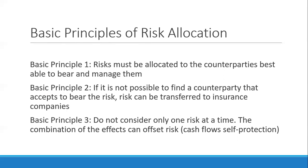The second basic principle is that if it is not possible to find a counterparty that accepts the risk, the risk can be transferred to insurance or insurers. Insurers bear some risks that are very difficult to mitigate — for example, fire or arson — risks that no one else will be willing to take. Since insurers are so diversified in the risks they handle, they may be able to bear that risk.